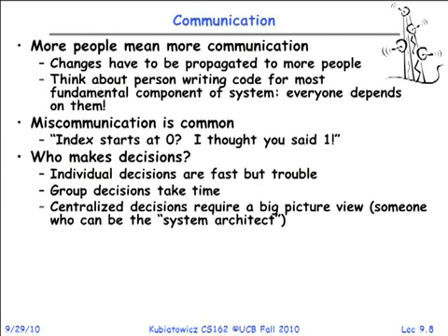So you've got to be really careful. If you end up in the role as the one person in charge of everything, people may not want you to be in charge. So you have to think about this. I'm not saying it couldn't work. It just needs some careful decision making. Designating a system architect, which is kind of task oriented, has some positives in that there are centralized decisions and one person has a whole view of things and can coordinate the APIs. The downside is it can lead to resentments. You've got to be very careful. That lead person better not be clueless. They better have really good people skills, and they better let other people actually do work.